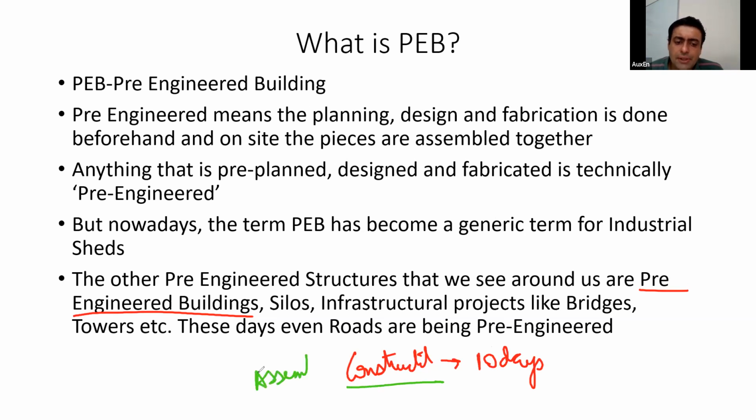Okay, just the puzzle pieces were fit together in 10 or 20 whatever days it took, but behind the scenes, obviously for several months, the design, the construction, the fabrication work would have been going on, isn't it? So when we say that the building was constructed in 10 days, it is just the assembly part that was done in 10 days. I hope you got that point.